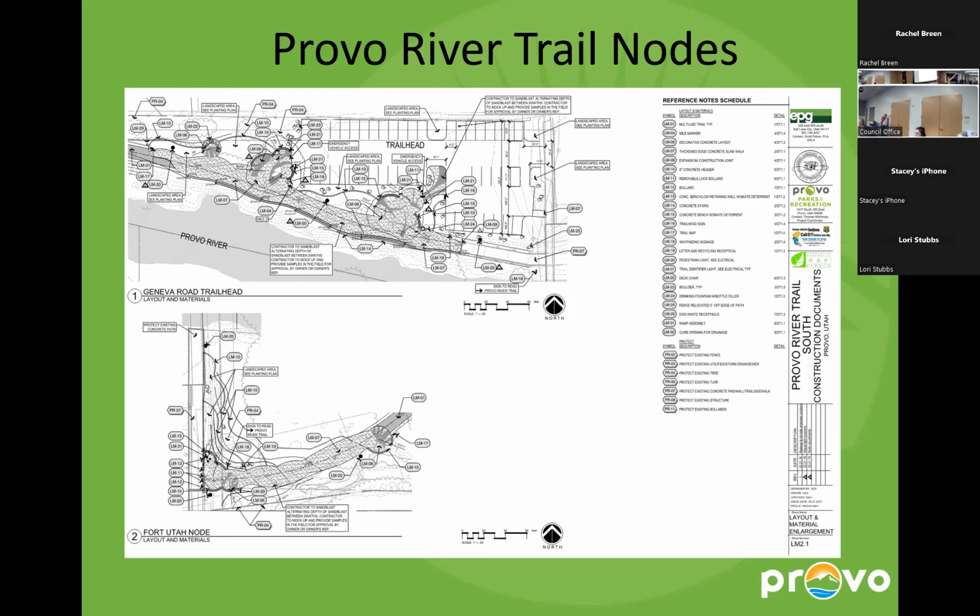It really bounces around. So, these slides that you showed us with the trailheads and things, are these all part of your, like, 5-year plan? Yes, these are all within it. Okay. Impact fees aren't necessarily limited to where you're collecting those impact fees, are they? No, we are able to use impact fees citywide, but they have to be used for expansion of facilities. So I have to build new square footage of park, or I have to build new length of trail.